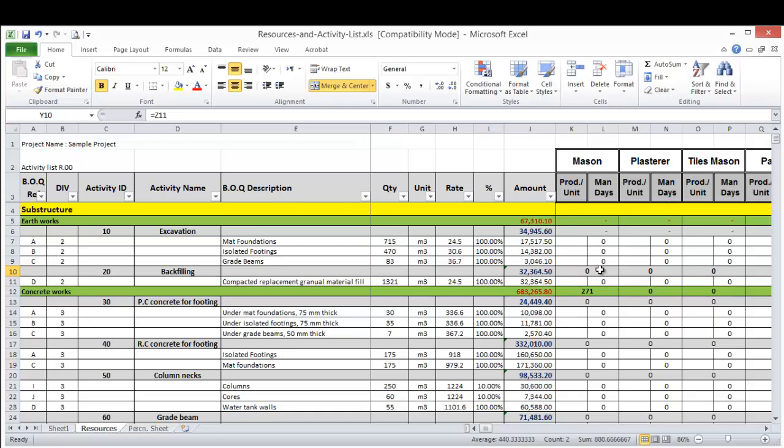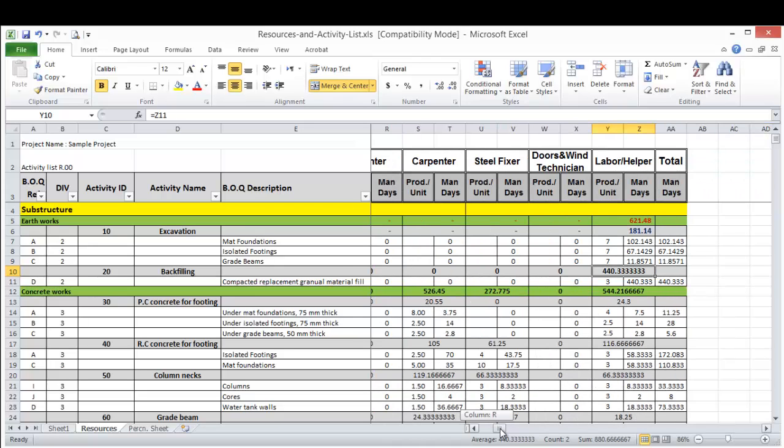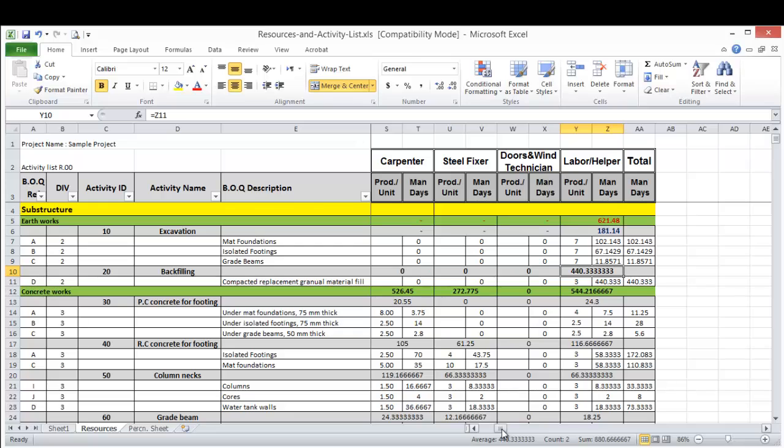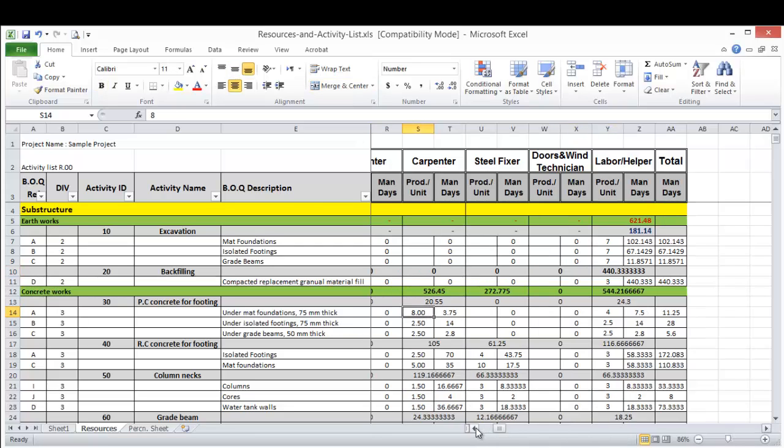And we will put this in Primavera, then the Primavera will distribute this total manpower on the activity duration and will tell us how many daily manpower required. So if we did another example here for carpenter, for example, for the PC concrete for footing, I assumed a productivity of 8 for the carpenter for the under mat foundation.